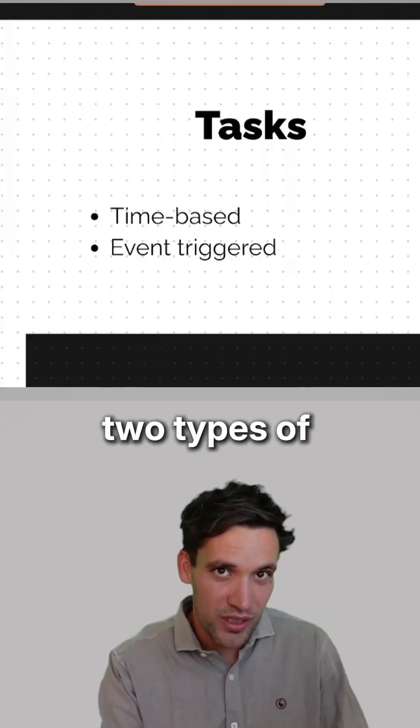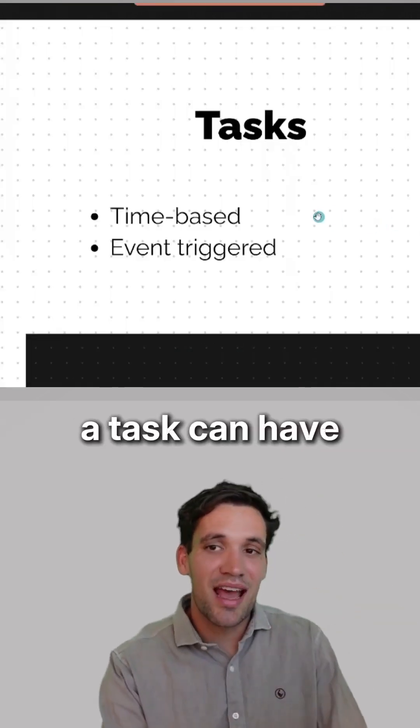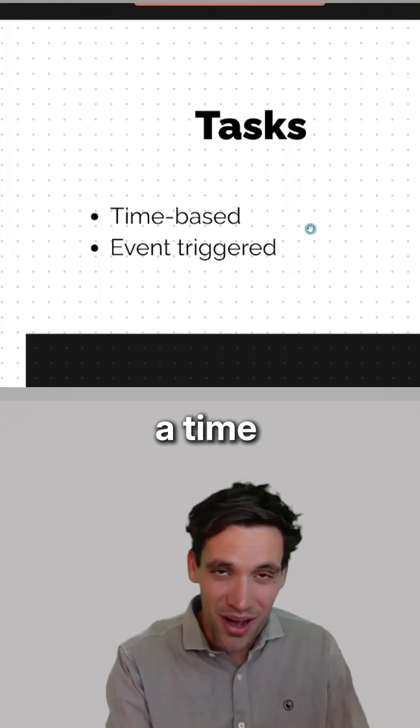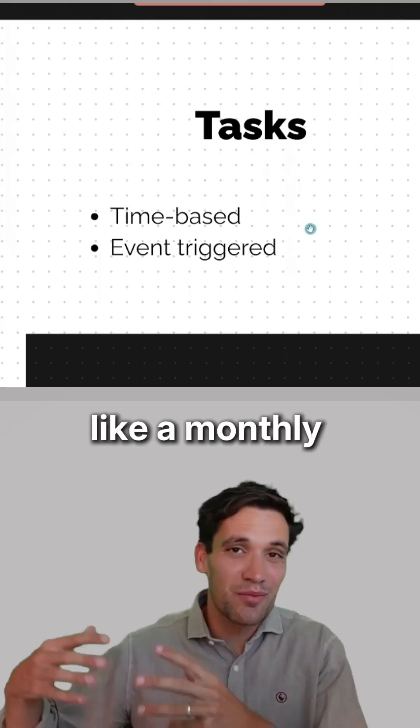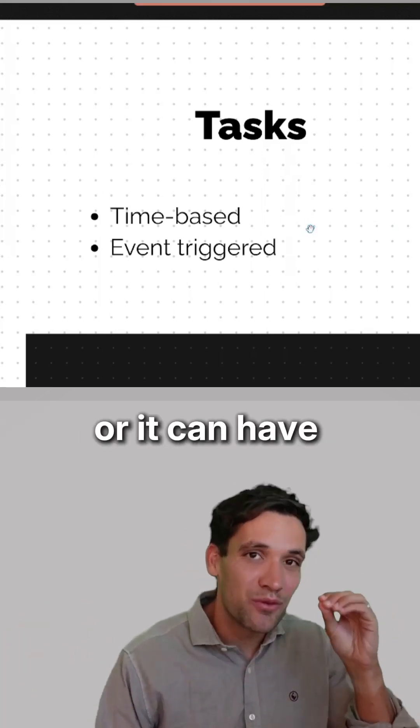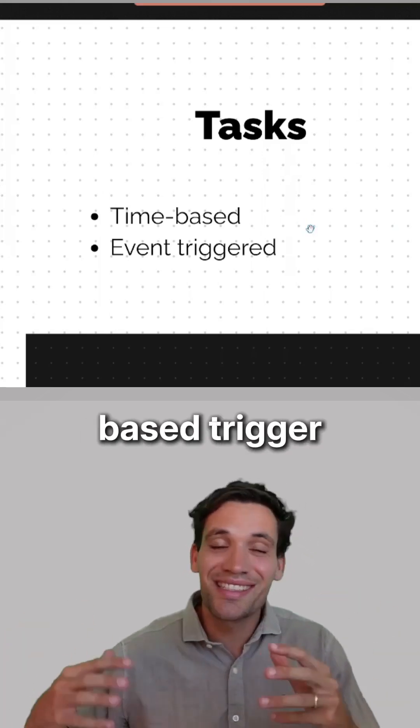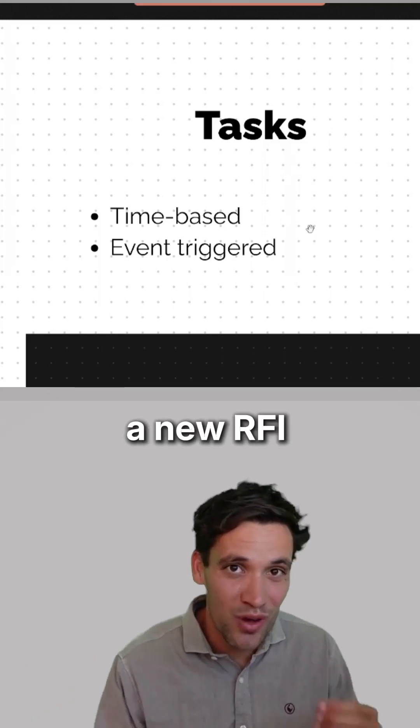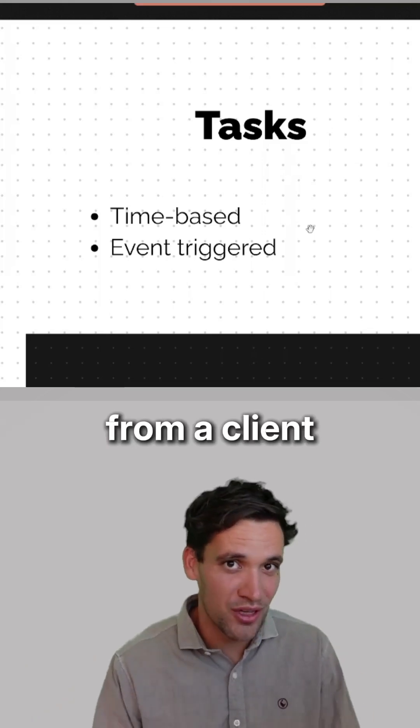There are two types of triggers a task can have. It can have a time-based trigger, like a monthly payment claim, or it can have an event-based trigger, such as a new RFI from a client.